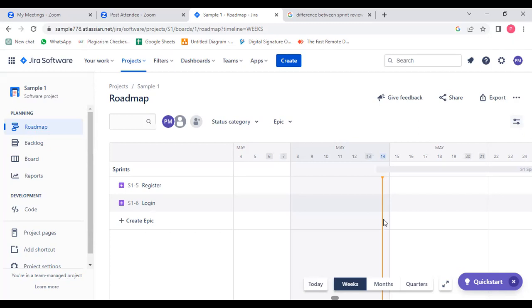See, the Gantt chart is actually about the time planned for the work, right? In the Gantt chart we will have the particular duration given. For example, if you have got a project of 12 months, 1 year, all the 12 months will be defined in the Gantt chart. In which month who has to do the work, we can clearly mention there. But when we come to agile, we can't define that. Every sprint changes and every day some work progress will be done, right? So here there is no particular final defined path, but in a Gantt chart we can define it.